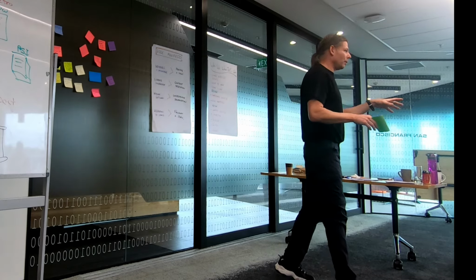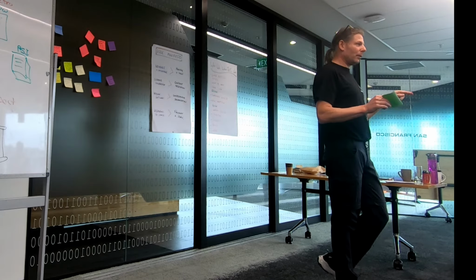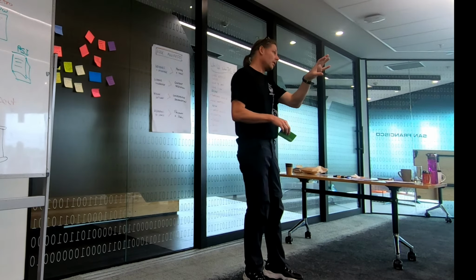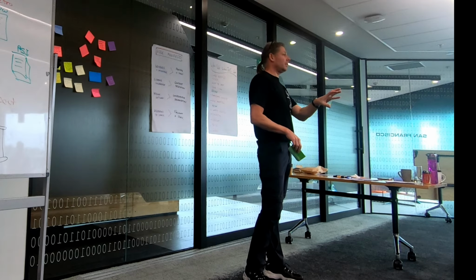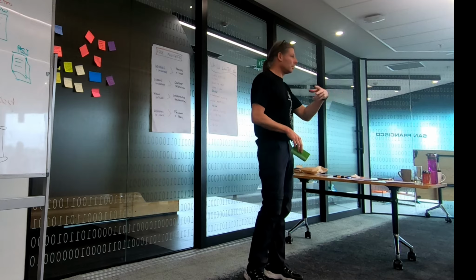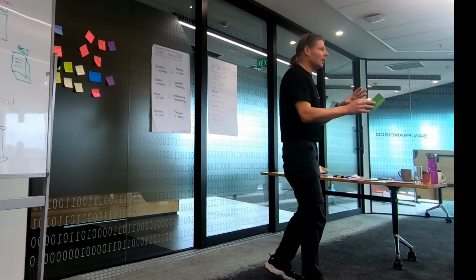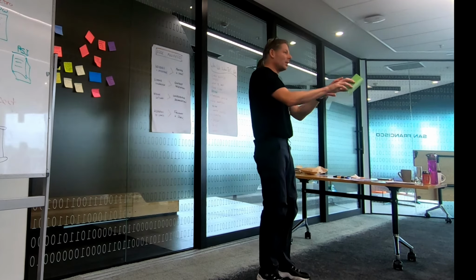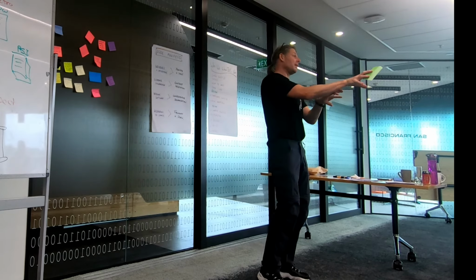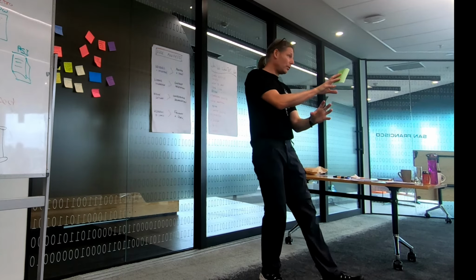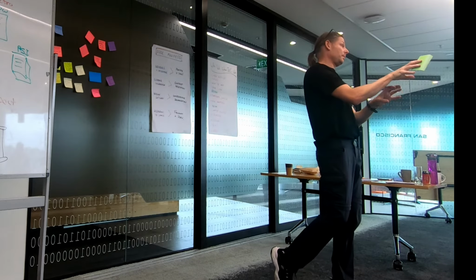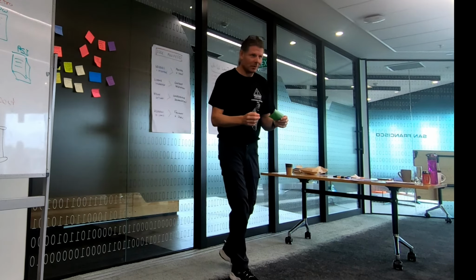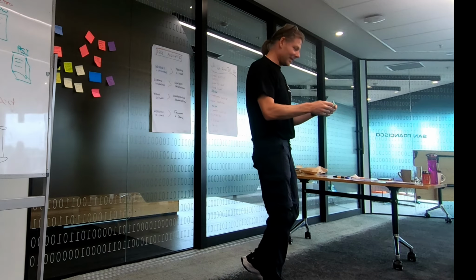I was actually thinking of the PE team. Now the fun thing there is they've got projects, so they're going to be using, I hope, Scrum for that. But then there's the ad hoc interrupt work. You know, somebody comes in and says, can I book leave or not? I know your job is far more valuable than that, so not to dismiss it. But we're going to try Scrumban, which is a blend of Kanban for the flow of work and Scrum for the project work. So that team's going to do Scrumban. Did you know? Yes, we talked about it, yeah.